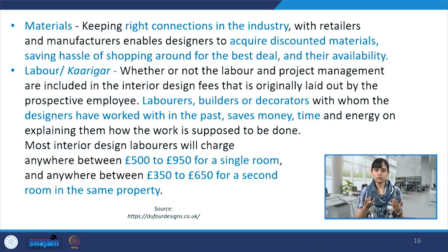Also the karigars who work on the site: what are their costs and what is their prior experience? Sometimes you have to pay them on a daily basis as daily wages. Sometimes it could be at certain stages in a project, stage wise payment. But many of these karigars also expect daily wages, because they need these to take care of their daily expenses.